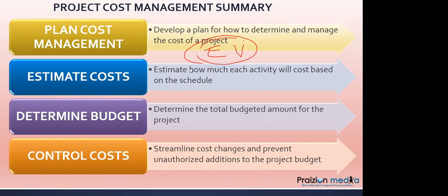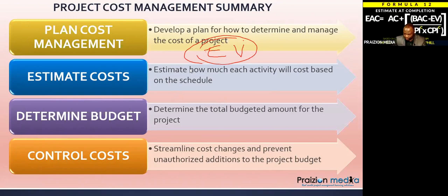That's right. So why don't you follow me to the PMBOK Guide, that page you guys love, page 267. Take a look at that earned value formula, the second one on that line. What does it say? It says the measure of work performed expressed in terms of the budget authorized for that work. And then it says EV equals sum of planned value of completed work. So it's a little bit of a lame formula for earned value in the PMBOK Guide.